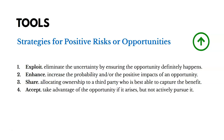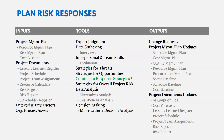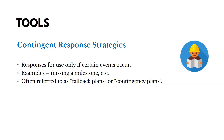Strategies for positive risks or opportunities include: exploit — eliminating uncertainty by ensuring the opportunity definitely happens; enhance — increasing the probability and/or positive impacts; share — allocating ownership to a third party so that working together makes the opportunity more likely to be realized; and accept — taking advantage of the opportunity if it arises but not actively pursuing it. There are also contingent response strategies — responses only triggered if a certain event occurs — essentially a fallback plan.